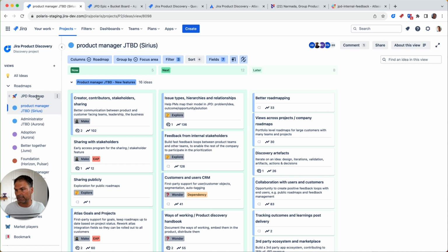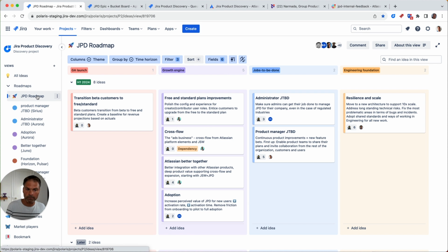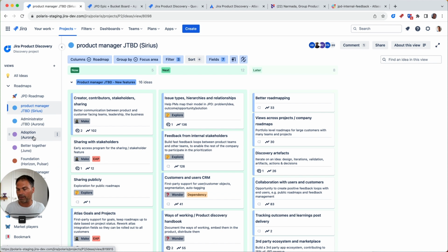This process is one that we do every quarter, but the roadmaps that each team has are things that we basically review every month, and we make adjustments within the month as well. So it's something that happens pretty frequently. And it's all based on everything that we learn by talking to you and listening to the volume of feedback that's coming in as well, taking those into consideration, mixing that with our business goals, and doing it.